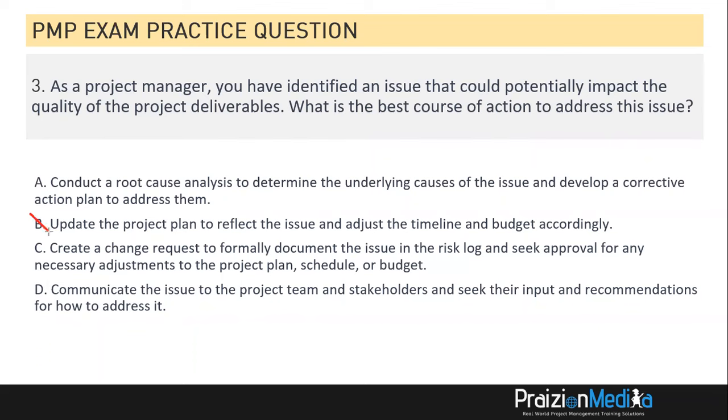Let's take a look at C. Create a change request to formally document the issue in the risk log. Well, we don't document issues in a risk log. It should be in an issue log. So we're going to go ahead and cancel that right off the bat.